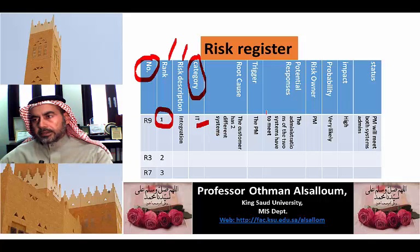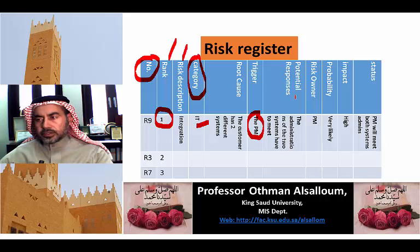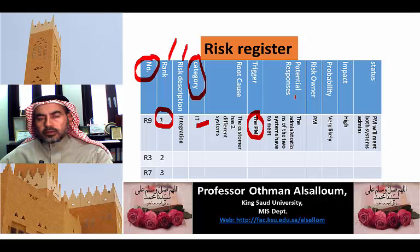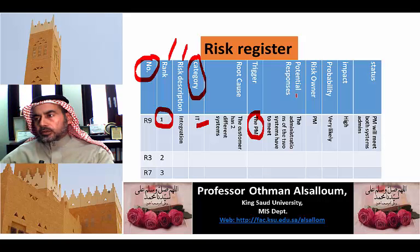This risk is triggered by the Project Manager. The potential response is that the administration of the two systems have to meet, so we have to arrange a meeting to solve this potential risk. The Risk Owner is also listed as the Project Manager.